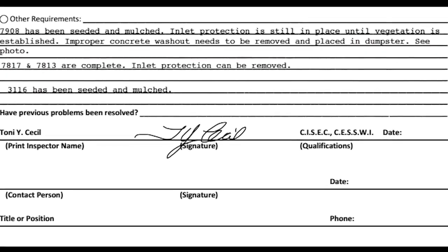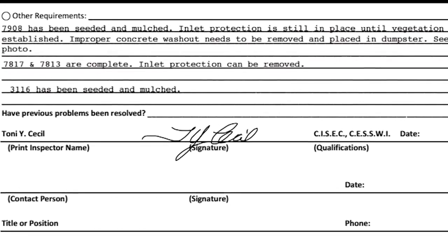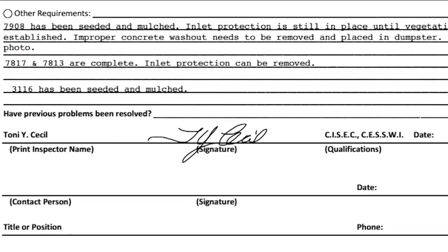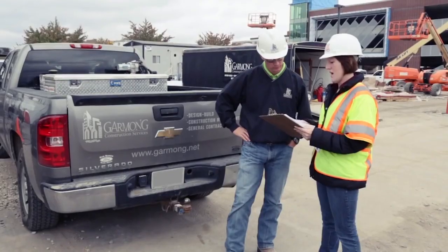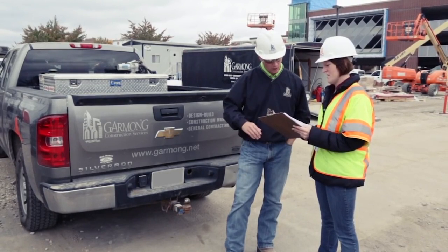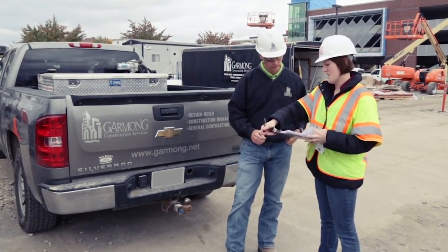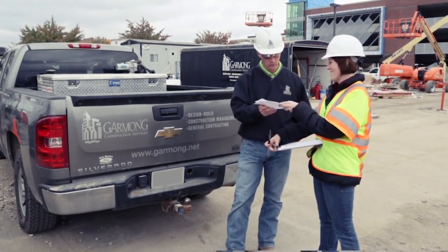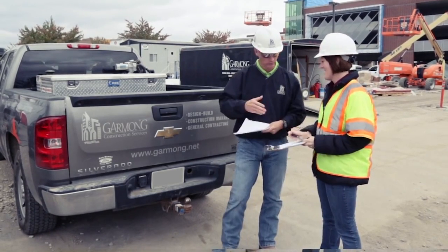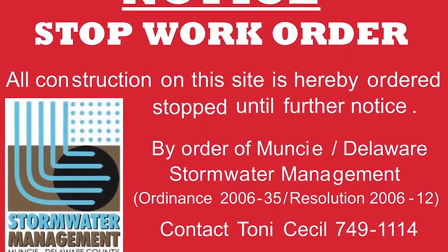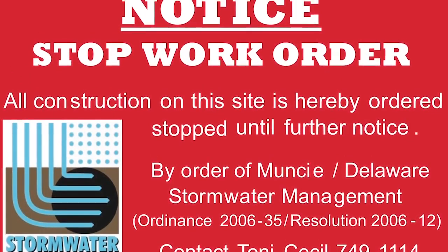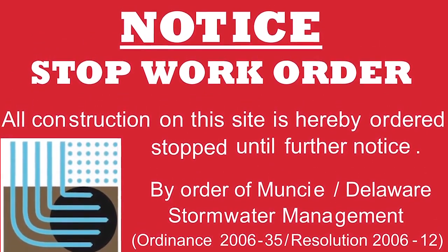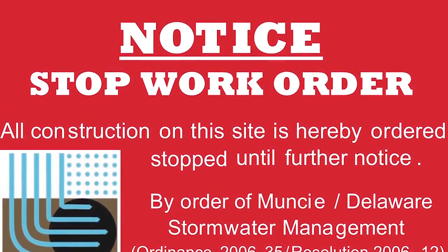Note a specific time for corrections and set the expectation for completion of specific elements and/or submittals to verify compliance. The time frame does not necessarily need to be the same as the planned return inspection date. Regardless of the approach, all items must be completed when you return. If the site has egregious violations, you may need to pursue additional compliance or enforcement measures, such as a pending stop work order or a violation letter.